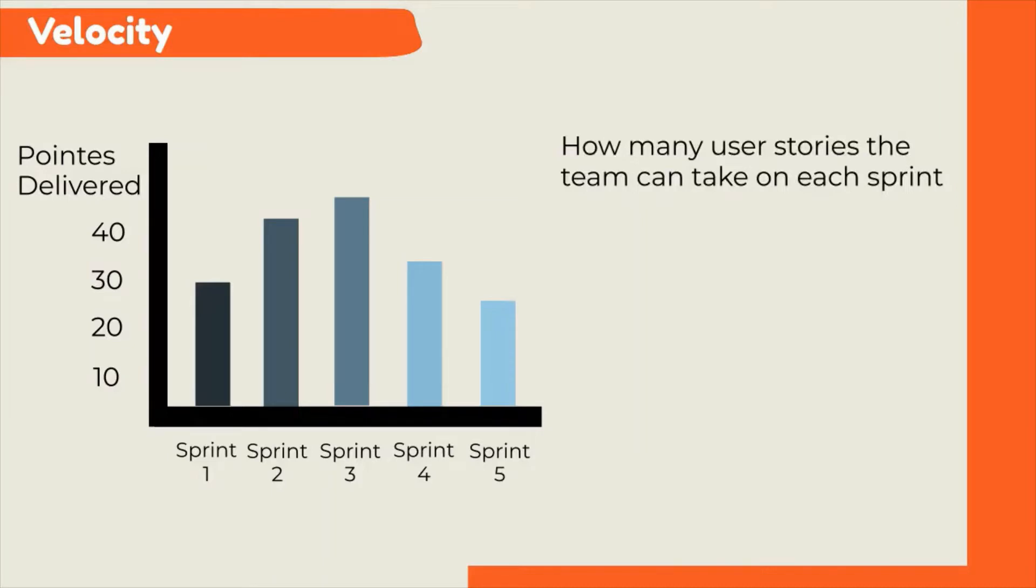Tracking the team's velocity helps predict the team's capacity for upcoming sprints. By experience, teams take three to four iterations to find their stable velocity. Tracking your team's velocity helps you turn your estimation units into actual time and cost for the business.